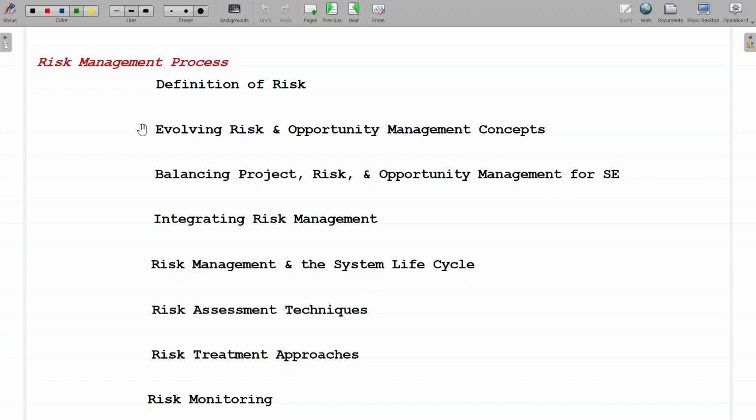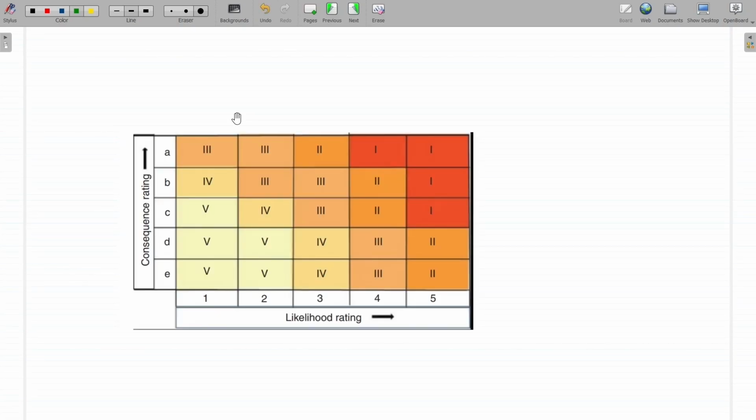The measurement of risk has two components: the likelihood that an event will occur, and the undesirable consequence of the event if it does occur. The generic consequence or likelihood matrix in this figure is a way to display risks according to their consequence and their likelihood, and to combine these characteristics to display a rating for risk level.